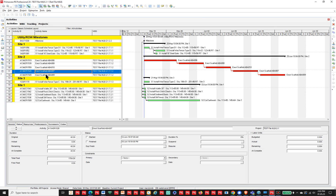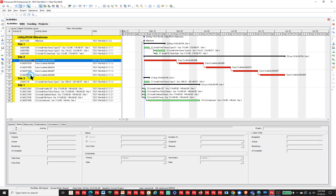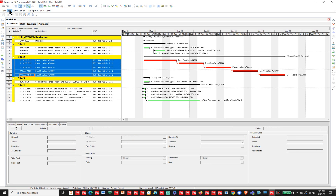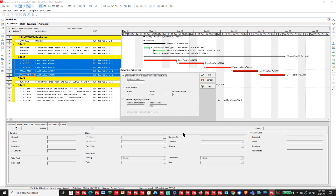I have some new activities for scaffolding in my little sample file here. If I look at the activity IDs, I'm thinking I didn't get that quite right — I need to change those. I can select all those activity IDs and you have access to Edit, Renumber Activity IDs. There are many different possibilities here, but I'll just go with a very simple change.